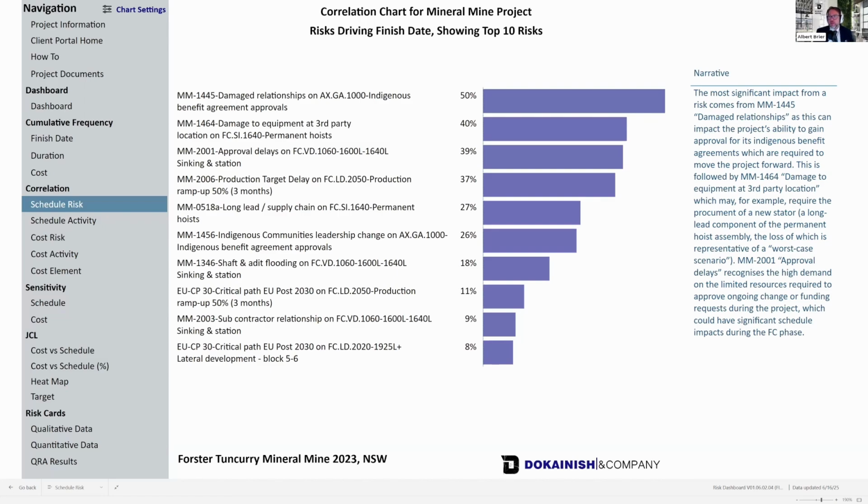For that, you still need a Monte Carlo simulation engine. Those of you that have gone under the hood on something like Safran Risk or Oracle Primavera Risk Analysis or Acumen Risk or any of the other fully integrated cost and schedule risk simulation tools like VOS Project Risk, they all have critical path method scheduling engines in them. Power BI does not have a critical path method scheduling engine. So yes, you do still need Safran Risk if you plan to update your inputs.